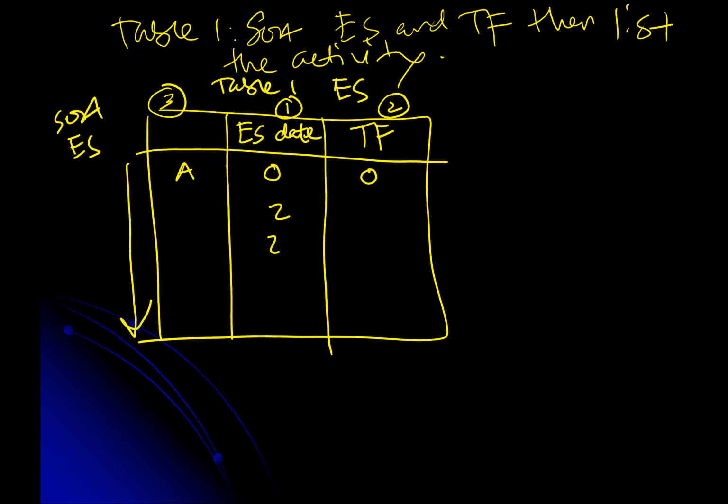You want to put either B or C. Then what could be your consideration? Because they are both the same date, you need to take a look at the total float. For sure, total float 0 will be prioritized, and put at the top first.